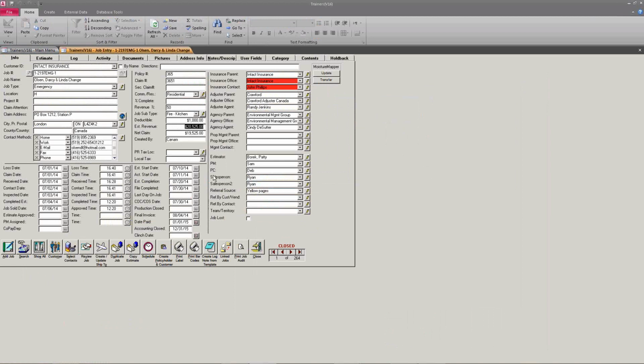The reason for it is this is your safety net. If you overspend on a job, you don't want to calculate any more revenue on that job than what you're entitled to invoice. So imagine a larger job going over a larger time span.